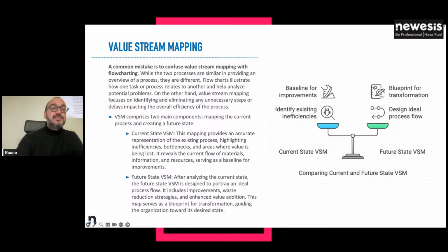From the moment it is inserted to the moment it starts to be written, it is queued for 1 day on average. Then it takes 2 hours to be written. And then after it's written, it will take 1 day before it is taken by the other team that will do the analysis, and so on. You need to identify all these measurements, and we will see some other examples after.